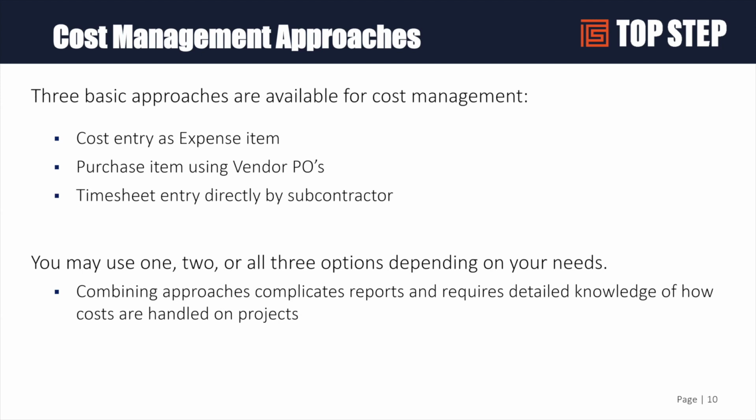You could actually have someone go in and create an expense report against that project. You could have an expense item for subcontractor costs, and create that expense report against that project for the amount of cost for that vendor invoice period. So that's one way to get that in. You can actually use approval processes for those to have project managers approve those costs against their project.